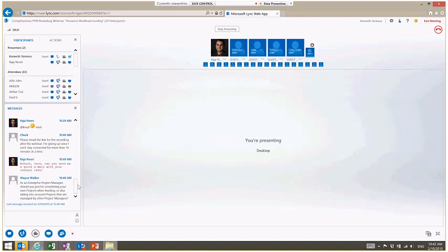However, since it might impact you, it definitely helps if you run some of the reports that we saw earlier, run the reports to look and make sure that the resources on your project are not double or triple booked elsewhere. So I would say from a resource leveling technique perspective, you just focus on your project. But from a project management perspective, I would go look at the various reports and see if you have over-allocations in the portfolio. Great question. Thanks, Wayne. Thanks for attending today.